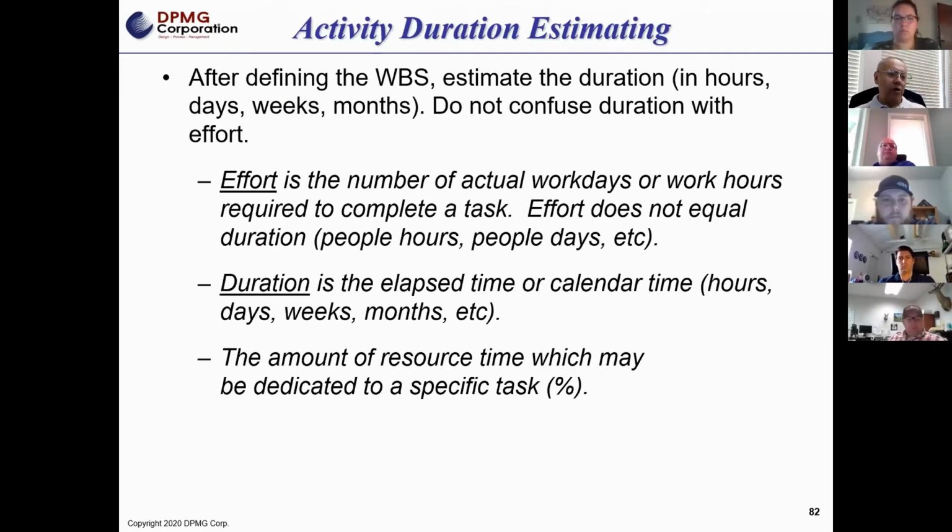So when we're looking at time, there are two numbers we need to look for. We've identified the skills, we've identified the resources, the number of resources. We're now going to calculate what is called effort hours. This is the actual labor hour. The definition of effort is the number of actual work days or hours required to complete the task.